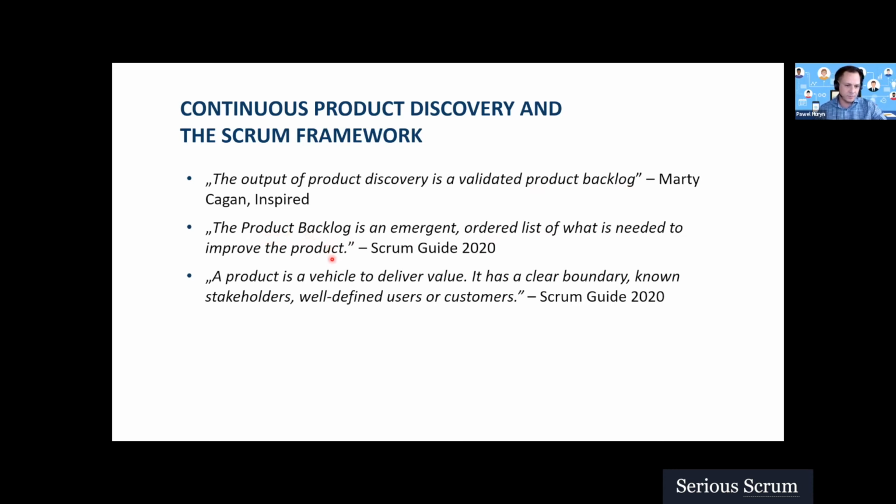If we have customer problems and some ideas how to solve these problems, I wouldn't call those ideas something that is needed to improve the product, because this is not validated. Maybe we don't even know if this problem will drive the expected business results. So I wouldn't place customer interviews and ideas that are at a very early stage in the backlog.